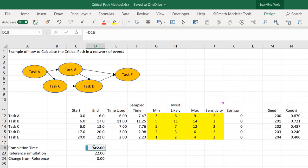What is the critical path in this particular simulation, this particular iteration, this trial? Well, how can we determine that? Let's think about it. If one of these tasks was shortened by just a little bit, let's call it epsilon, would this time change?